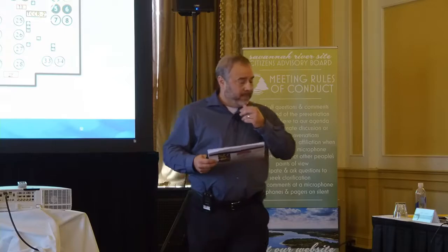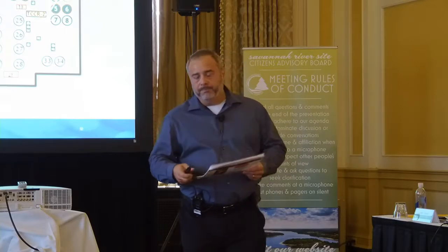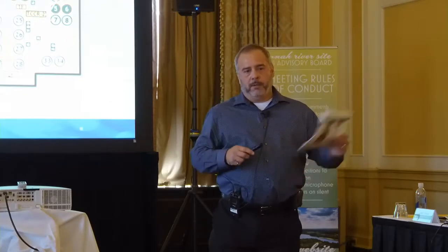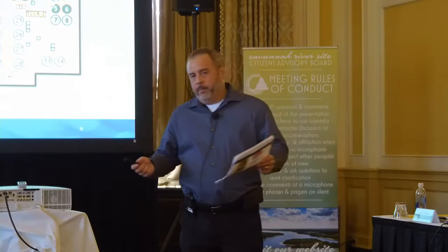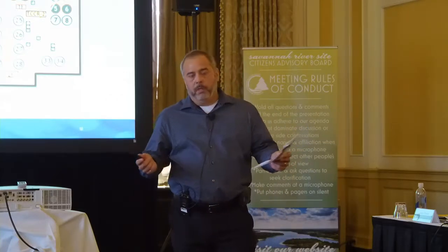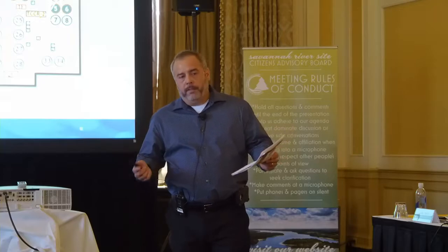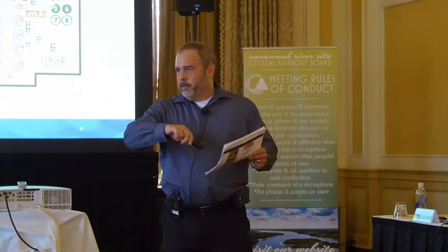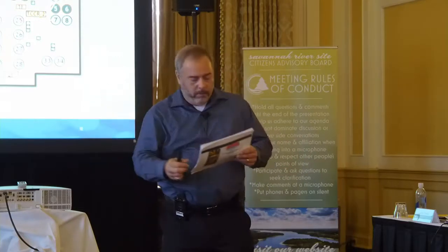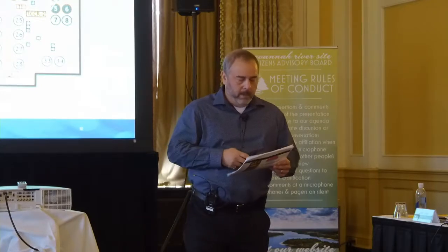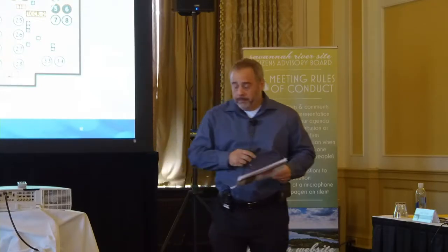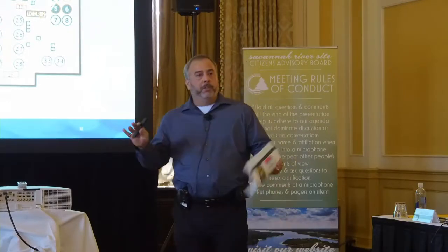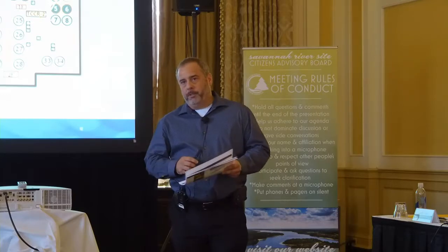And then on the other side, on the salt dissolution side, they're currently trying to construct the hose and hose transfer lines that will go from 9 to 10. Right now, they're in the middle of removing old equipment from the risers on Tank 9, where we're going to install the transfer lines and then bring over to 10. And then ultimately, going forward, this one's a little bit further out, but we have a potential future project which would be ticker unit number 2.